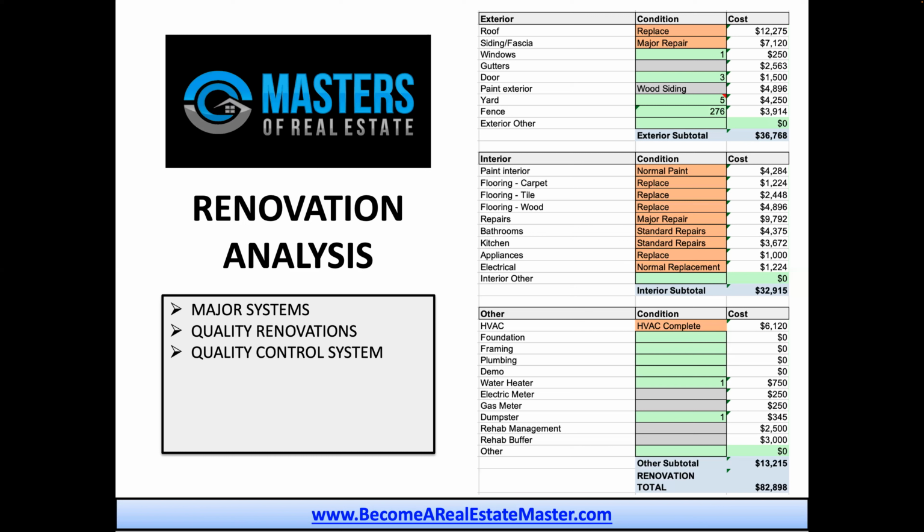You want to go get those inspections before you list the property, so you're aware of these major issues that will scare off a buyer. You want to be able to go through and give them all the information, so you don't have problems come up where something falls out of contract and then gives you another 3 months on the market, because now it's been a long time sitting on the market and people are lowballing you and all that kind of stuff, all because one person backed out because the inspection came back ugly for some things that your contractors missed and you didn't have the proper quality control in place. So get inspections after the renovation is done.